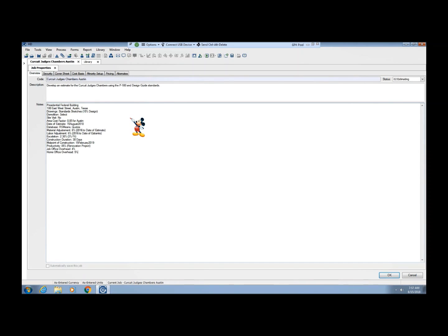Sometimes you have design costs, sometimes you don't, but we go ahead and put in the line item, even if it doesn't apply, just to know that we acknowledged it or addressed it. Design contingency, same thing, we'll put it in there sometimes. It's usually not in there.